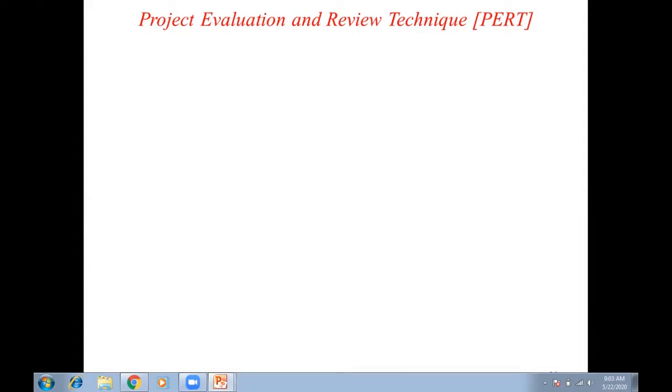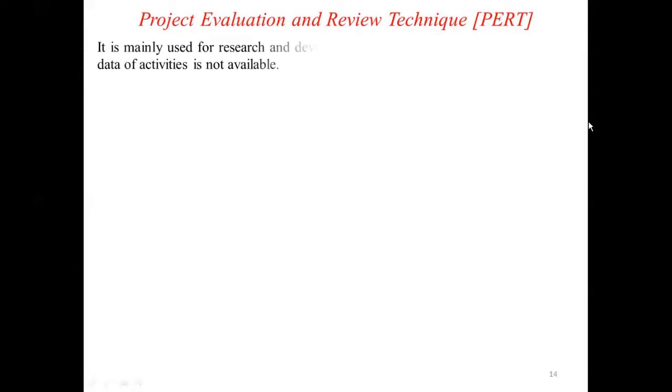Program evaluation and review technique, commonly known as PERT, is mainly used for research and development work. It is adopted when past data, that means the previous data, is not available. Then we use the technique known as PERT, that is project evaluation and review technique. In PERT, we estimate three timings.